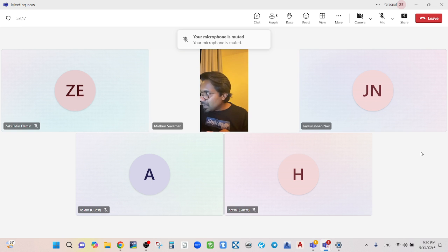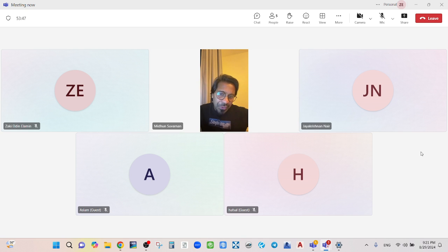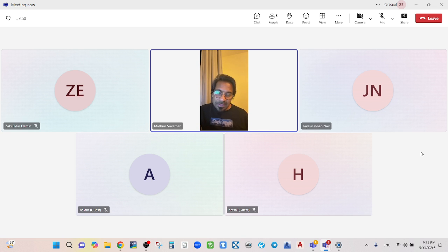You know why? Because if he backs out, or fails to submit the performance security, or fails to sign the contract, I need to do the retendering. I need to spend an equal amount of time and cost. For an employer, maybe in the case of Jayesh, he may not know tendering, so he will call a cost consultant and say, I can pay you this much amount, please do tendering for him. So again he has to pay this amount, and time and cost, everything will be there. That's the reason you need a tender bond, and that is the function of a tender bond. Clear, guys?